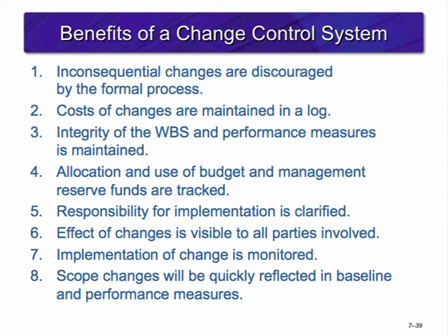The benefits of using a change control system are: 1. Inconsequential changes are discouraged by the formal process. 2. Costs of changes are maintained in a log. 3. Integrity of the work breakdown structure and performance measures is maintained. 4. Allocation and use of budget and management reserve funds are tracked. 5. Responsibility for implementation is clarified. 6. Effect of changes is visible to all parties involved. 7. Implementation of change is monitored. 8. Scope changes will be quickly reflected in baseline and performance measures.